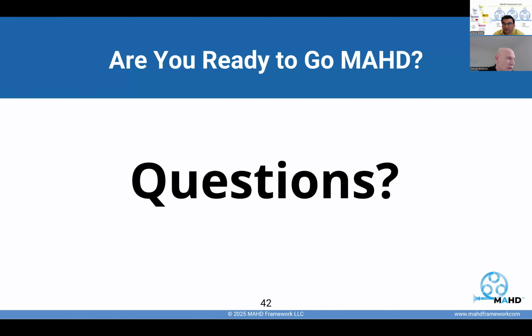So, Vishal, I got one for you. A lot of companies have to deal with things like industry certification. So this person said, how can MAHD Framework handle things like medical compliance or other certifications? All right. Very valid question, very relevant to the hardware industry. The simplest way to answer that is, in MAHD, when you build what we call our iteration plan, which is essentially the way to manage the project at a high level, it's kind of milestone driven. We say, look forward and plan back.